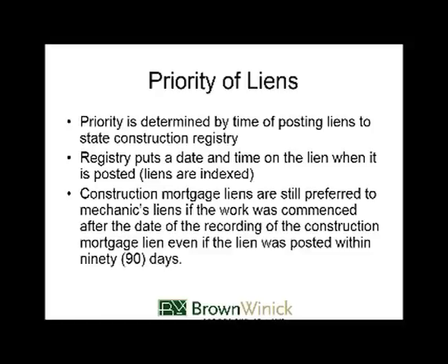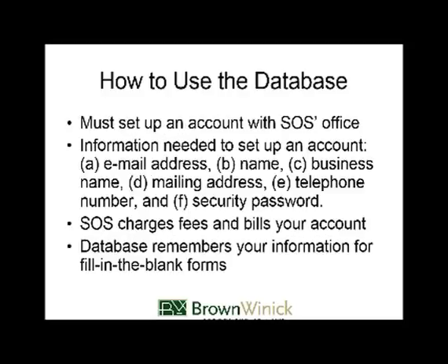Again, these liens are indexed, the timestamp is put on them. Construction mortgage liens are still preferred to mechanics liens. Basically, if the mortgage was first, it's going to get preferred. If the mortgage comes afterwards, there'll be a question, and usually the lien can win out over that. And that's even if the lien gets filed within its appropriate 90-day period.